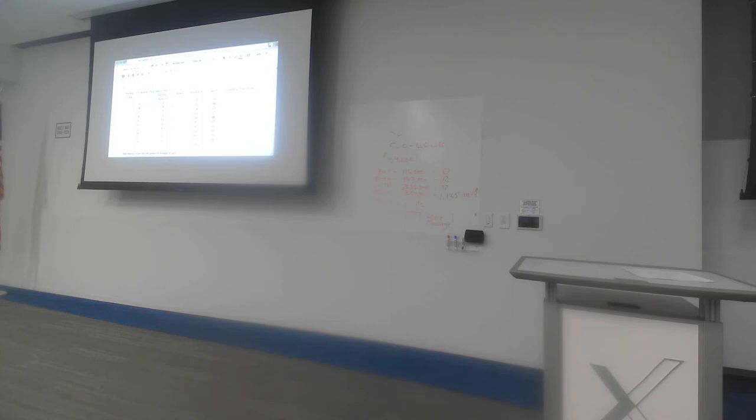So to do that, based on the figures that I have at the moment, I'm just going to get a rough estimate, and I'm going to say, well, if it costs me €20 to crash the activity E by 4 days, then to crash it by 1 day, I'm just going to take €20, divide it by 4, and that gives me the figure €5. So on average, roughly, it will cost me €5 to crash activity E by each single day that I'm allowed to crash it by.